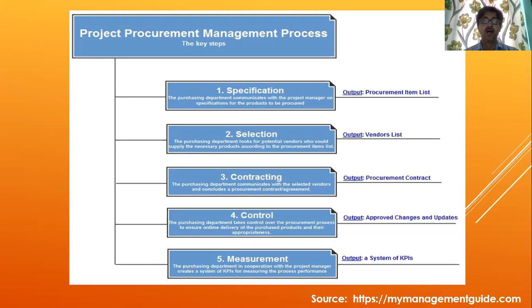Whether the items I am receiving are damaged or not. So whether the packings, if the things are coming in packs, if the packs are proper or not, or if the packs are torn off, then you have to report again. You have to send back the items. So all these things you have to take care of, and this is basically the control.